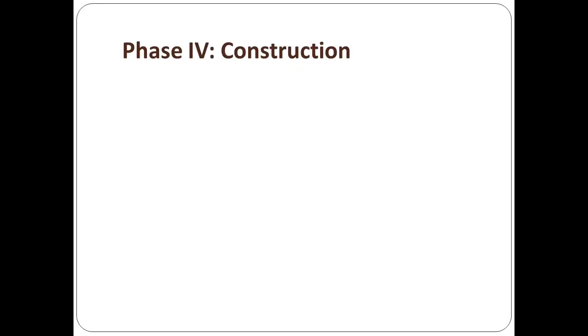Now to the construction phase. How will you select your builder? If you use the traditional, you're doing it through the bidding. If you're doing design build, you're probably doing it through the interview or through the process where you have 3 or 4 design builders with their architects submit their version of what your vision would look like on your site, and you get an idea of how well you work with them.